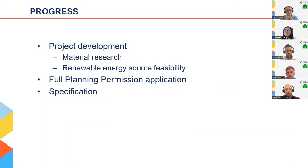Right now, we have submitted a full planning application and are awaiting the decision. We are in the process of preparing tender documents, but before we came to these, different surveys and research on materials and systems were conducted or commissioned, including intrusive work to check the existing structure and materials. We are taking steps to de-risk the above-mentioned technical challenges.